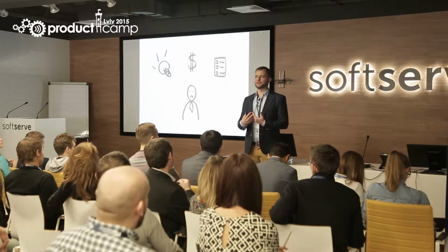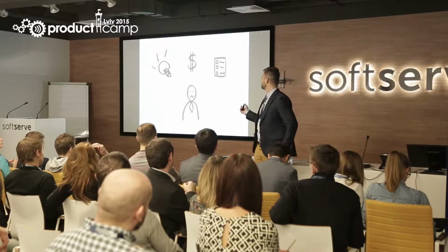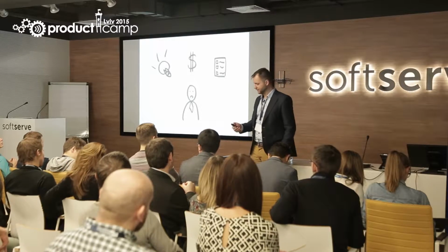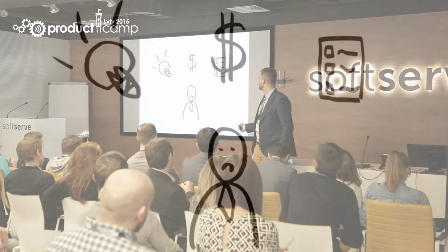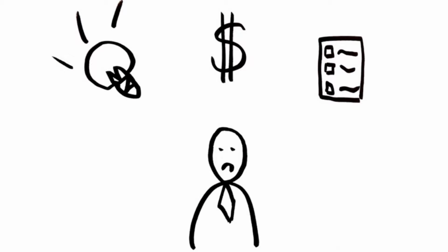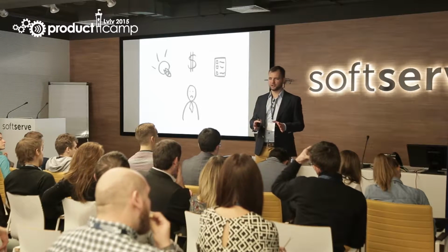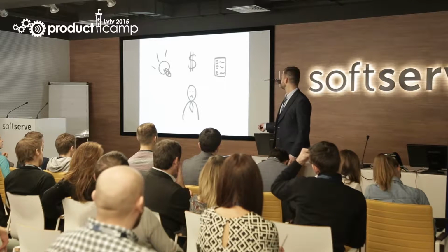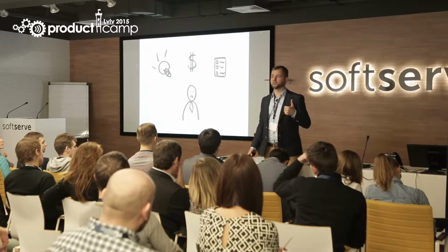It's a role. And to fulfill that role, you have to have three artifacts. The first one is the vision of the product. The second one is a budget for the product. The third one is a list of requirements. You manage this. If you are a product manager and you have these three, and we're talking about Agile, you're a product owner.